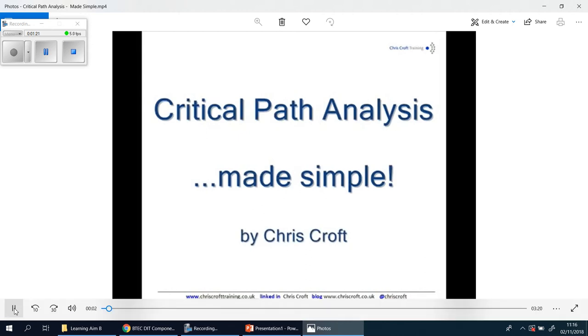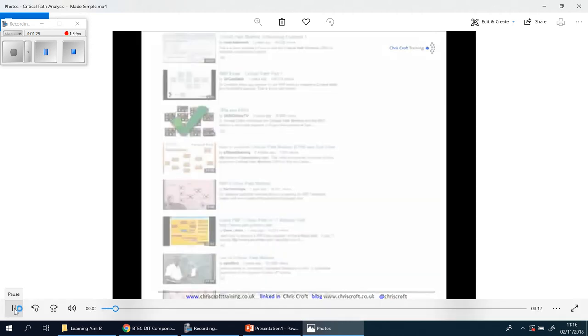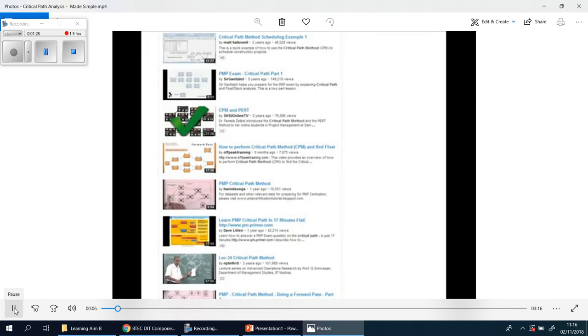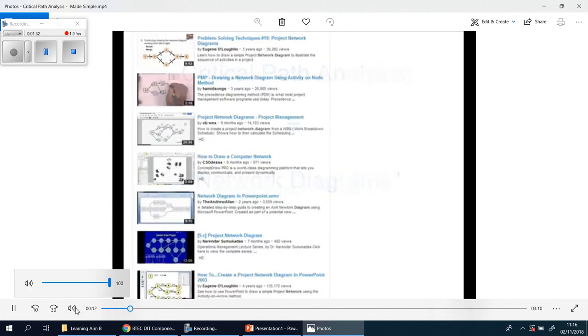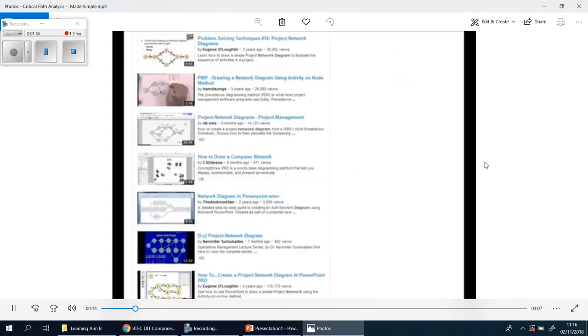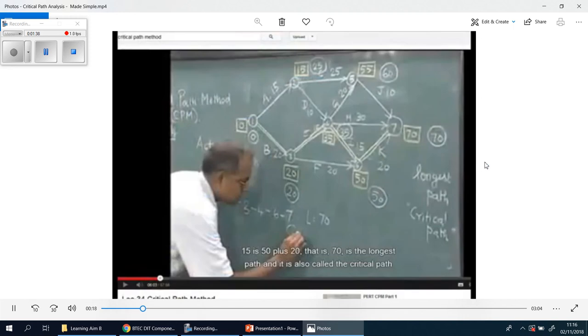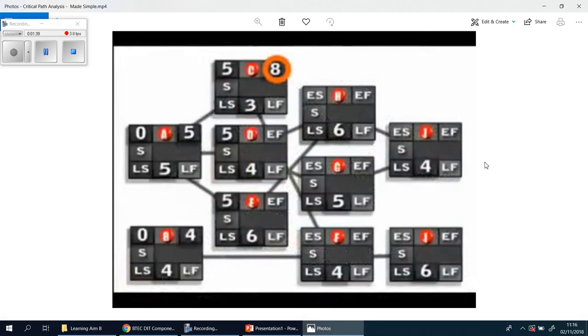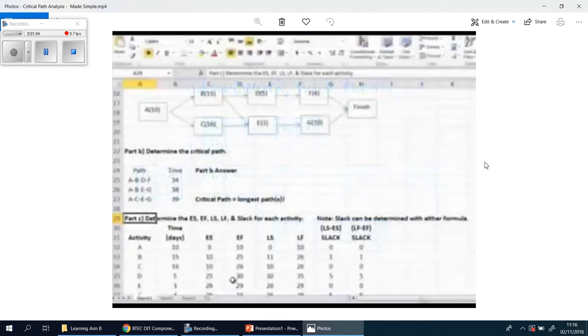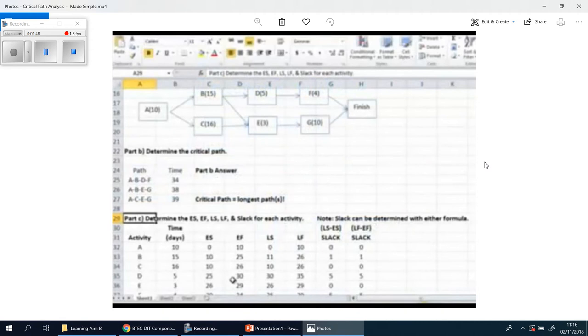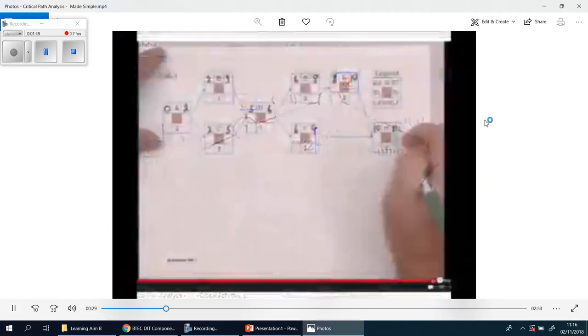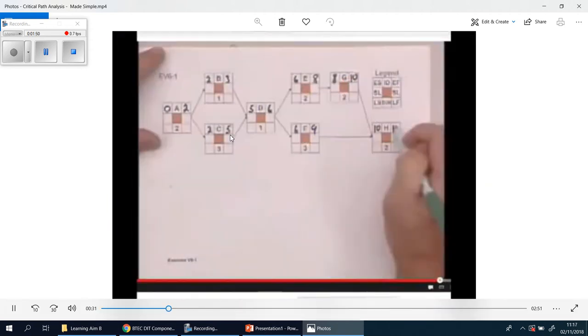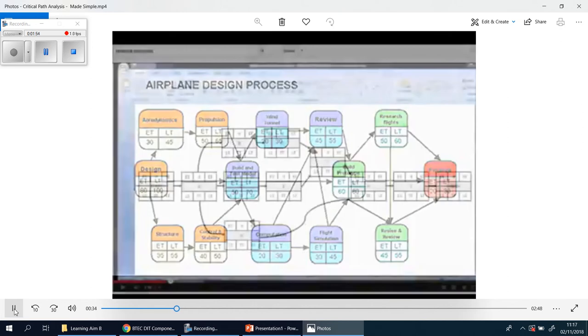Critical path analysis made simple. I've been looking on YouTube at how people teach critical path analysis, also known as network diagrams, and god they make it complicated, don't they? You do need to find the critical path because it's the longest route through your diagram and it's therefore the quickest that you can do your project. You can't do your project quicker than the longest route.